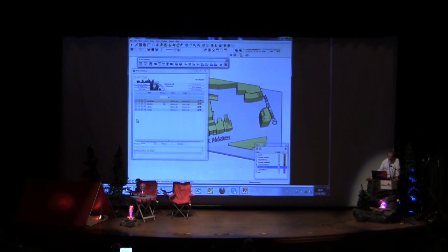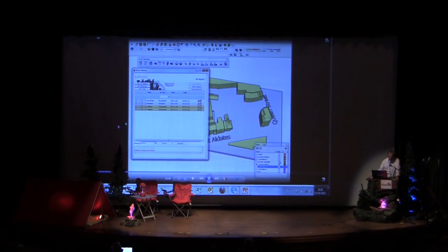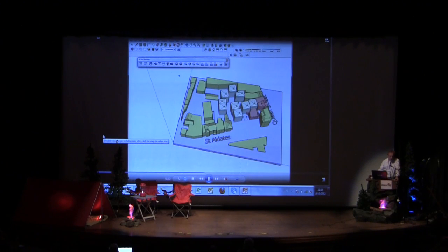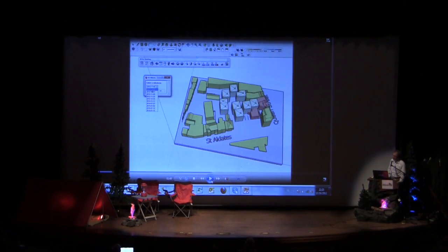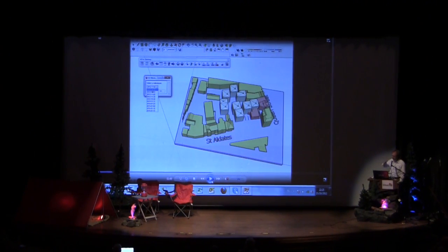Okay. One thing to do before we have a model is to define the activities of the different tasks. It can come also out of MS Project, but in this case, we only have a very limited planning. So what I'll do is I say 2 construction, 1 demolition, and 1 environment planning. And then our model is ready to use. And in fact, then I can navigate through time. And for instance, here I've got a list of all kind of milestones. So milestones are the moments of modification, of beginning of ending of a task, of an activity.